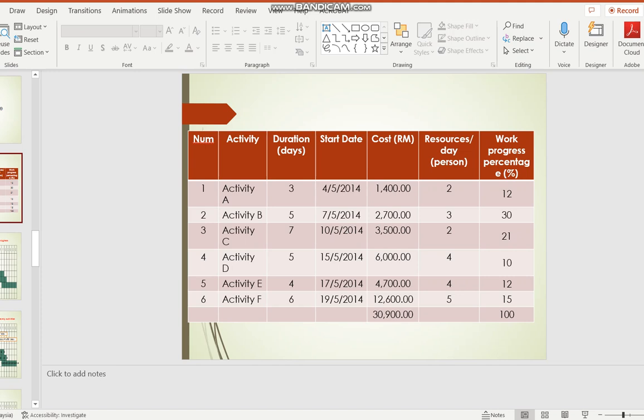So what we are saying is, how much percentage of physical work will this particular activity contribute to the final project? That's why a lot of people get confused with costs, because if my cost is 1 million out of 5 million, then they think this is 20%. You can think of it like that, but it is not accurate all the time, like I said. So I need you all to put down very clearly what percentage activity A would contribute to the final project, and activities B, C, D, E, F, your whole layer 1.